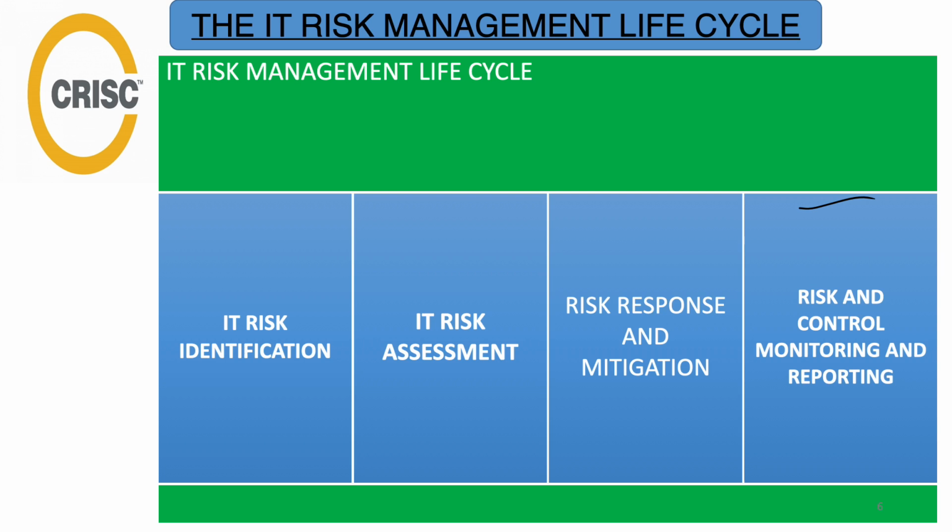The first is IT risk identification. We have to identify the risk, right? Risk profiling helps to identify the changes to the internal and external risk environment at an enterprise and client level and supports the identification of emerging risk. This is the first step when embarking on a change program or activity, but risk should be identified throughout a project life cycle.